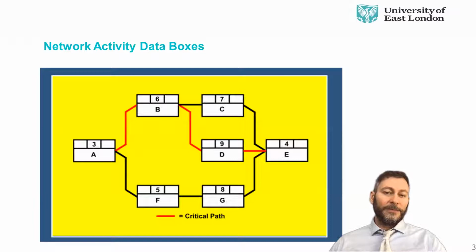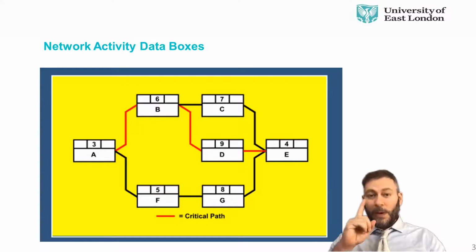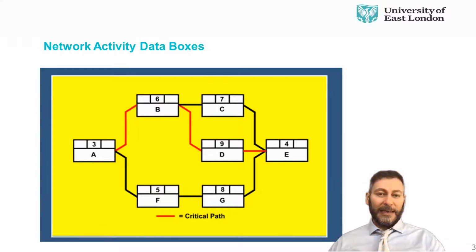And the objective is to find the total duration of the project and something we call the critical path. The critical path, outlined in red here, indicates those activities that if they're even delayed by 1 day, the whole project will be delayed by 1 day. And we want to avoid any delays as much as possible. The ones that are not in the critical path, it means we have some flexibility. If they're late 1 or 2 days, the number of days of delay that we can still manage with will be indicated in something called slack.